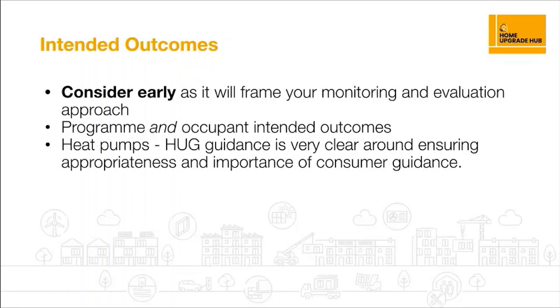Intended outcomes, I want to include this because I think it is really important that you consider it early, because it will frame the approach that you take to monitoring and evaluation. So even when you've got your retrofit advisor at the beginning, thinking about how do we make sure that the outcomes that a householder wants and that we want from programme level, how are we documenting those so that we can follow them up again at the end and make sure that we've met them or not.